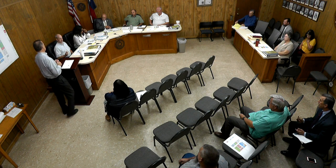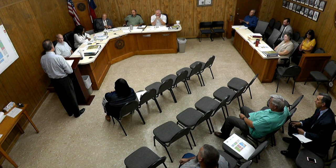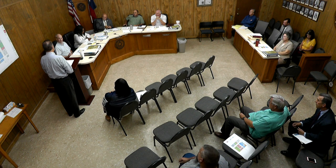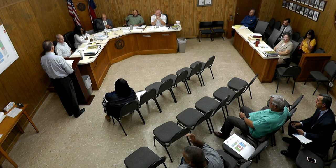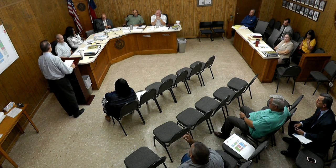Just to clarify, how do you get paid? I'm billing on a monthly draw by phase. But if this is approved, how would you get paid in this process? Is it a percentage, or is it a flat fee? I'm based on our flat fee. If the construction cost goes up or down, you're flat, you're steady. Through design development, the construction document phase is what's left.